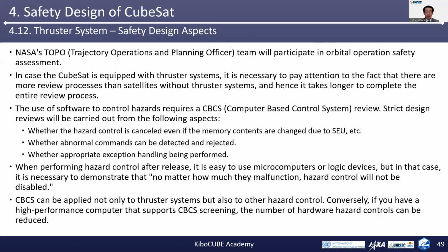And in case the CubeSat is equipped with thruster systems, it is necessary to pay attention to the fact that there are more review processes than satellites without thruster systems, and hence it takes longer to complete the entire review process.